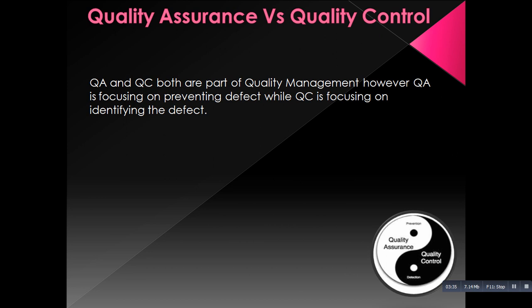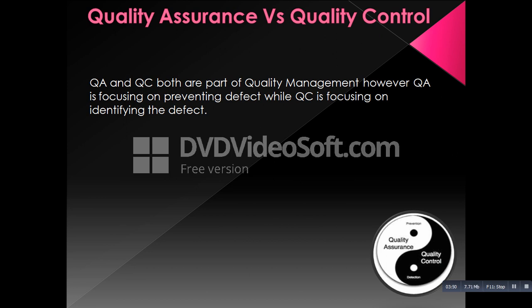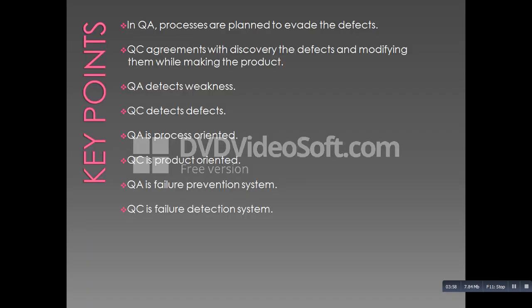Quality assurance is proactive, which means it focuses on prevention of defects, whereas quality control is reactive and focuses on identification of defects. Quality assurance contains static testing whereas quality control contains dynamic testing. In summary: QA plans to evade defects; QC deals with the discovery and modification of defects while making the product. QA detects weaknesses whereas QC detects defects. QA is process-oriented whereas QC is product-oriented. QA is a failure prevention system whereas QC is a failure detection system.